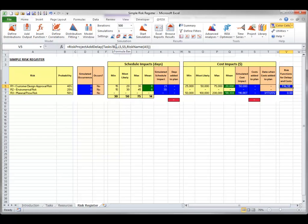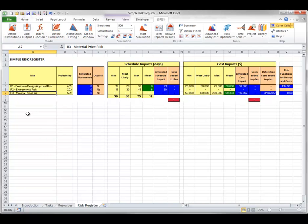A second Risk Project function, called Risk Project Add Cost, adds an additional risk-related cost at a specified time. When a risk event occurs, this function adds a cost only to the project's cost calculations. In this example, the material price risk in row 7 results in an additional cost being added to the project when the risk occurs — this could be additional raw material costs incurred within a specified timeframe. When appropriate during the simulation, the At-Risk function Risk Project Add Cost adds this new risk-related cost to the cost calculation in Project.